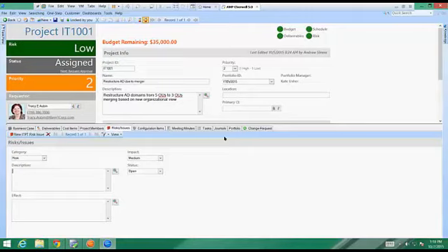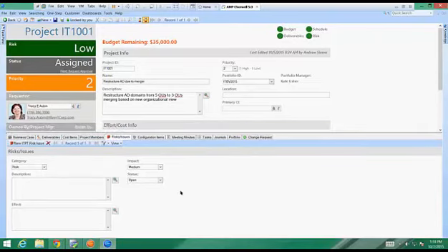Oh, that's excellent. So what we're doing right now, Tiffany, and this is a facilities side that is asking for this, but it would still have the same kind of playback here. They have work orders instead of incidents. In their work orders they are tracking their time, and then we're rolling all of the time in those work orders up into cost items within the project.